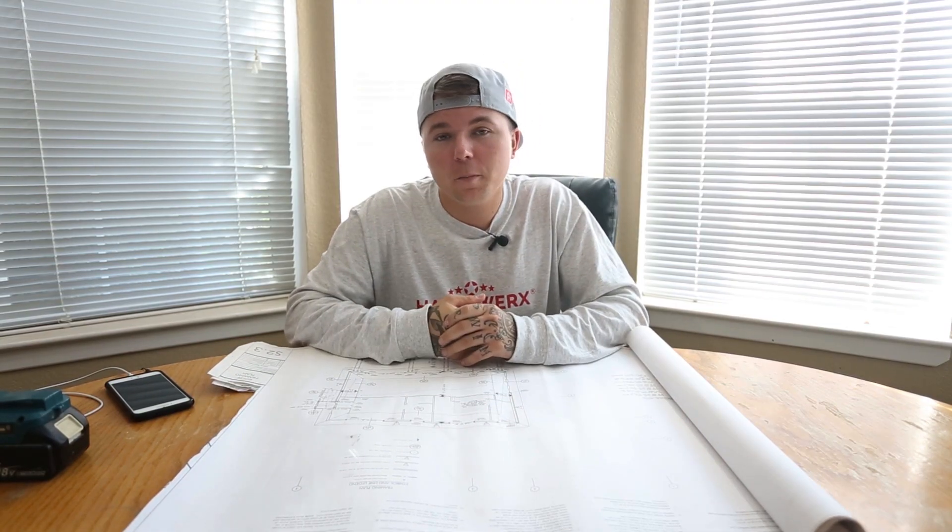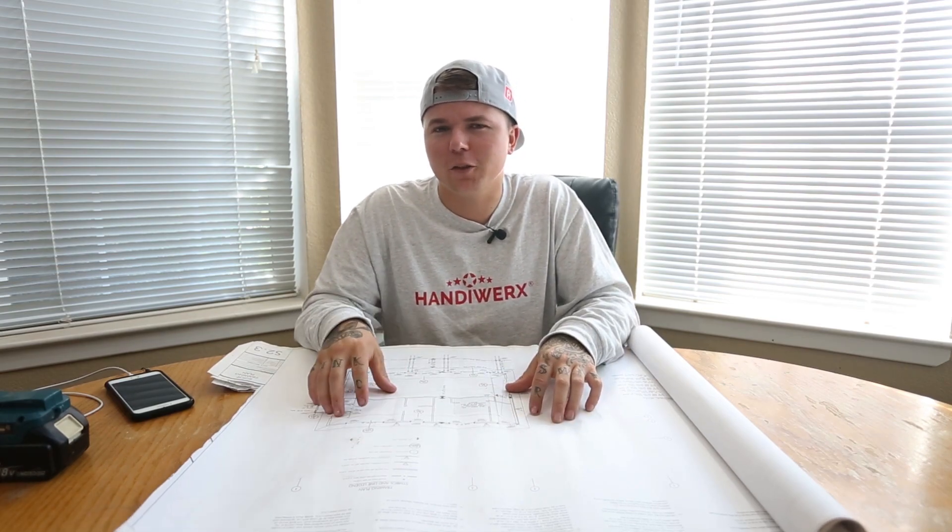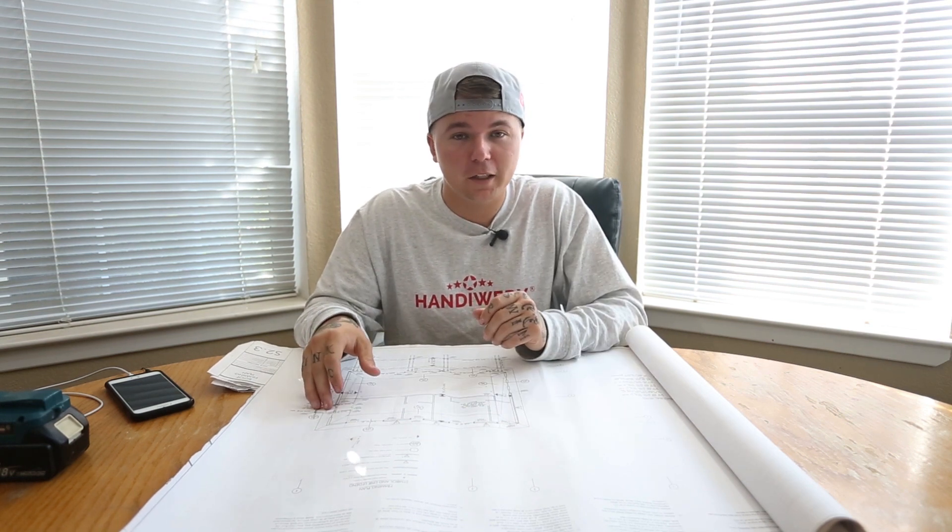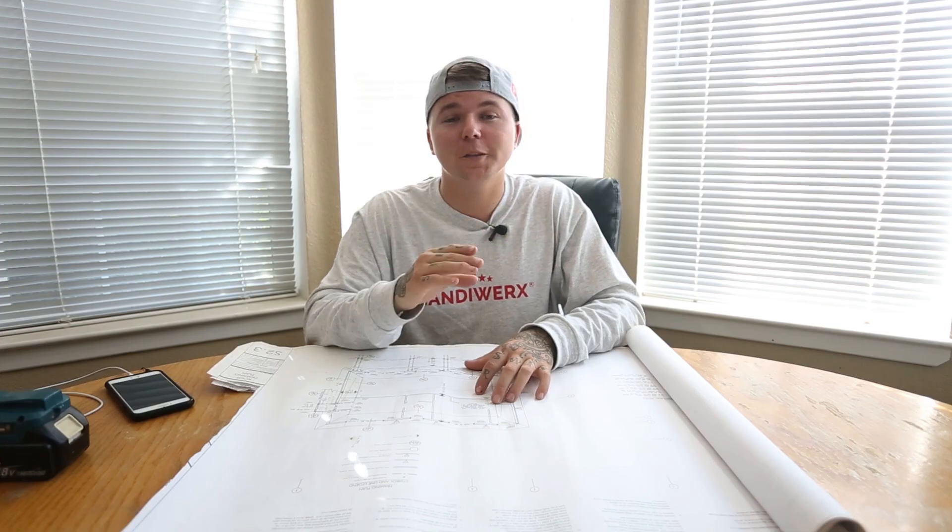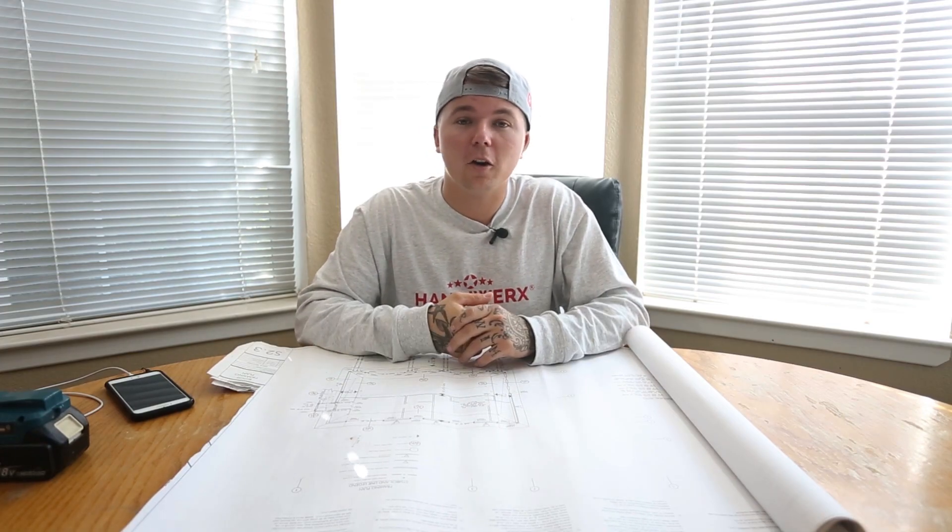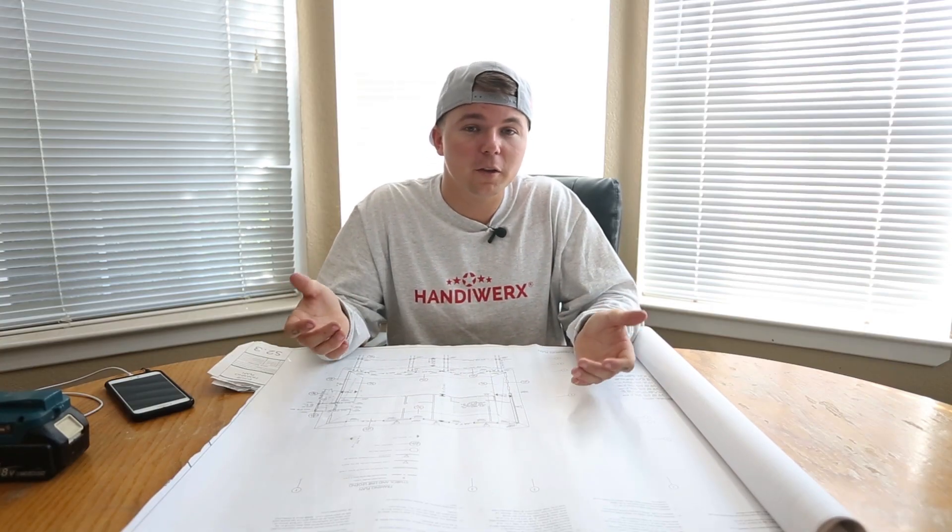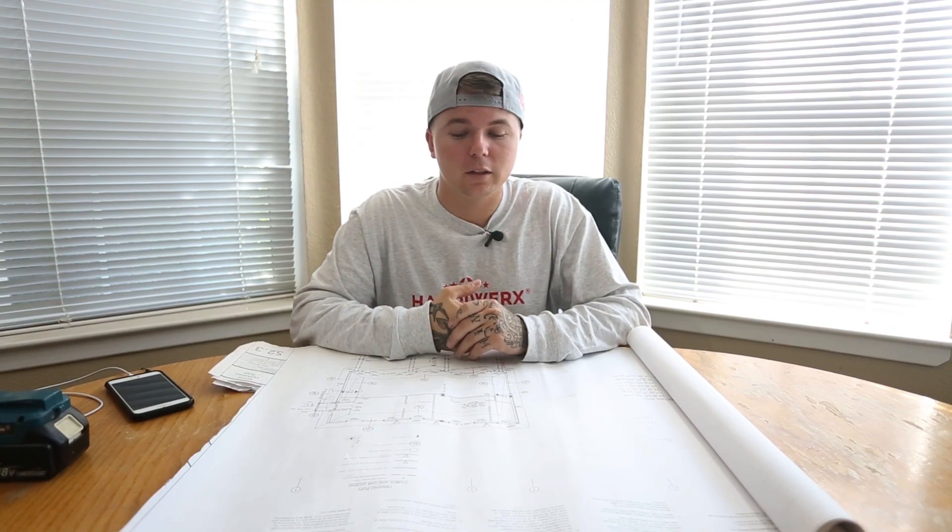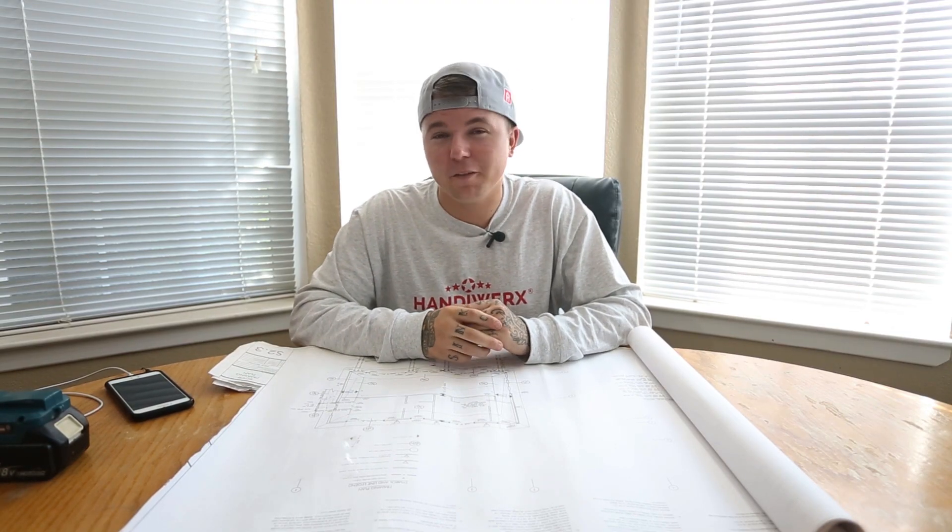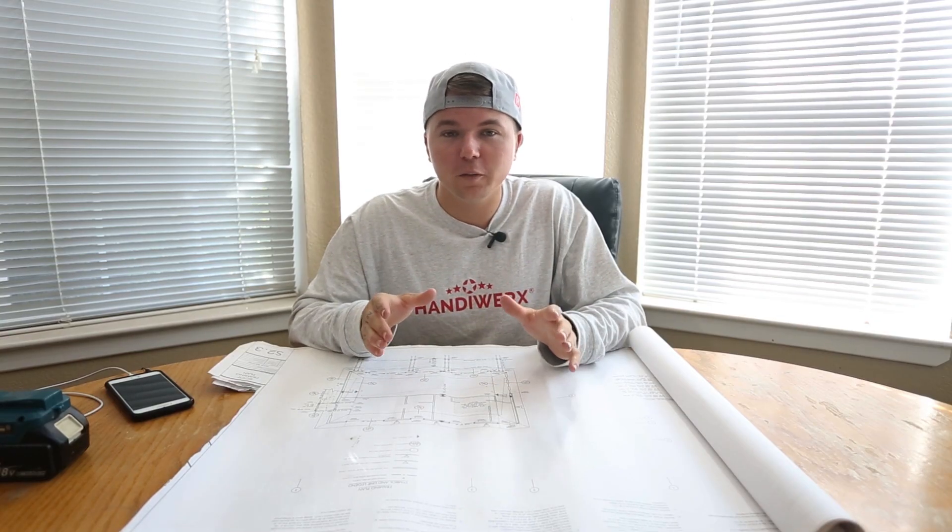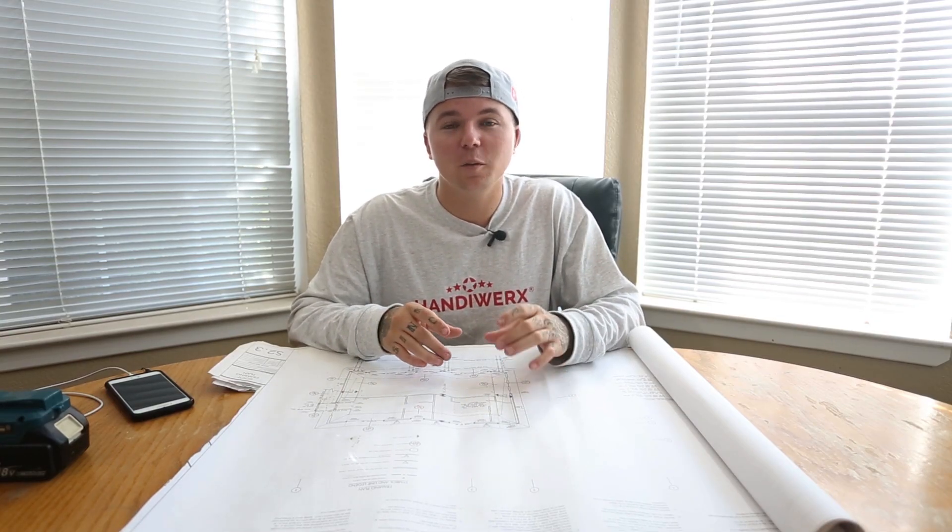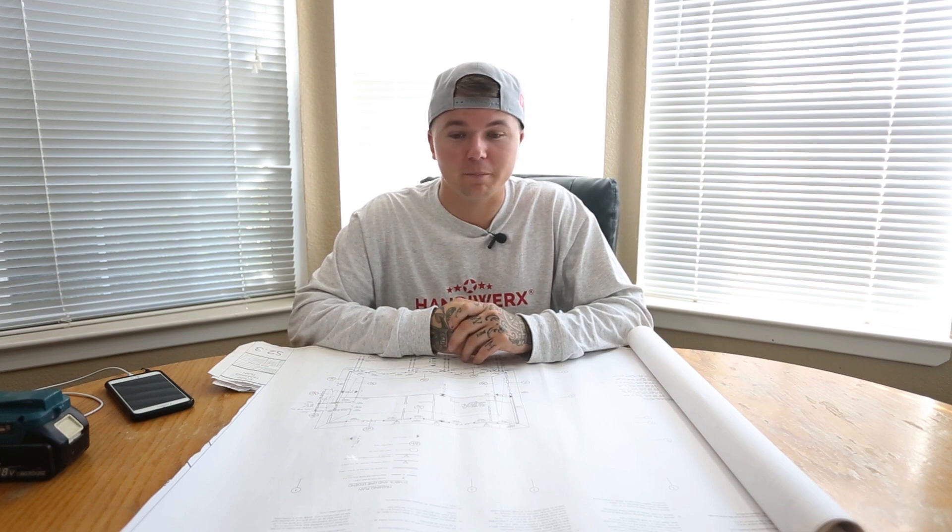And then lastly we learned about RFIs, a request for information. If you're ever confused about something and you work for a framing contractor chances are you should contact them. Say you have a staircase that isn't working out. On this build in particular we had a staircase that ran up and the stair stringer ran right through the center of a window. We sent in an RFI as we cut that first stringer and asked him hey is there anything we can do for this. Get rid of the window, move the window, let us know. From there we were able to block that window out, get rid of it completely, and put a new one in in a lower location. You are not allowed to just move stuff in a building though. You can't even move one window. Everything is planned for a very good reason. So do not move a single thing without consulting with everybody.